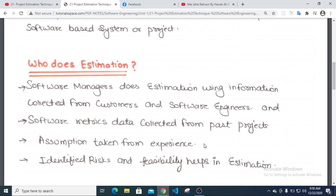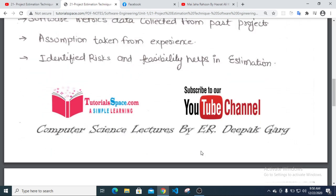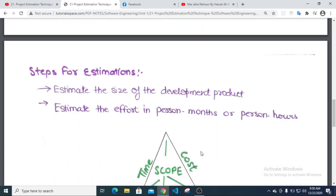Experience is taken from books, and it helps identify risk and testability, which helps in estimation. Steps for estimation: first, estimate the size of the dependent product. When you prepare a long estimate, they calculate it in person-months or person-hours.